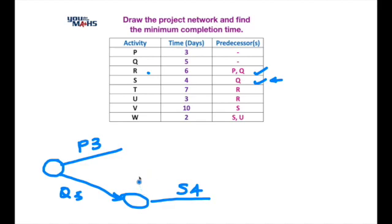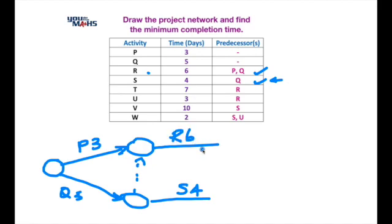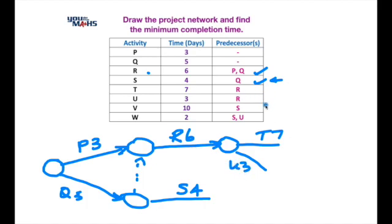Because activity R has predecessors P and Q, we need to draw a dummy activity coming off the end of Q towards the node where P is completed. This indicates that S can proceed after just Q, but R cannot start until both P and Q are done — which is what that dummy activity is doing. We draw activity R off that node for six days. Moving down the table, T and U both come off R, so we place a node at the end of R and draw T for seven days and U for three days.